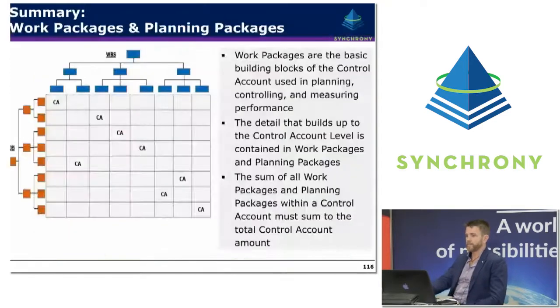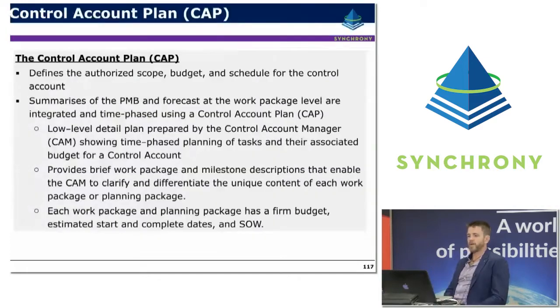So in summary of work packages and planning packages, work packages are the basic building blocks of the control accounts used for planning and controlling measuring performance. They make up the detail that builds up the control account. So it's basically a summary of work packages and planning packages, but all of the actual performance is being done within the work packages. The sum of the work packages and planning packages will equal the overall budget for the control account, but all the work that's being earned and all the actual costs are coming through against the work packages.